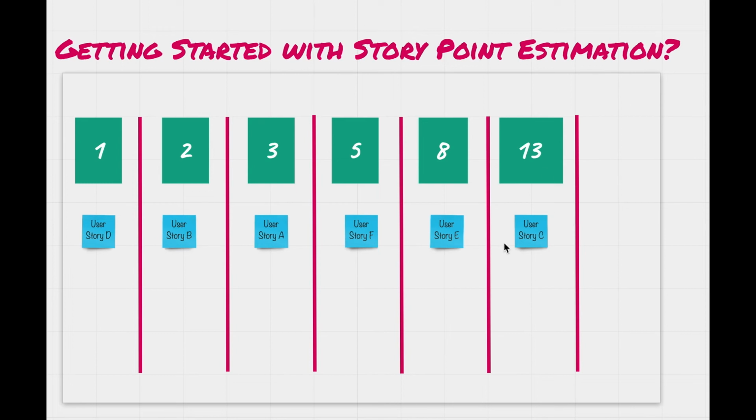Now this is the thing that we are doing at the end of the sprint. We are doing this to make sure we map our effort to correct story points at the end of the sprint. Now you move to sprint 2. Now you have different user stories that you're thinking of doing on story points. A few things that you already have is a tentative idea of what is one story point and what is two story points, what is 3, 5, 8, 13, and maybe even more. Also, you will have some idea about velocity, how much story point was completed in that sprint. So while estimating story points for other user stories, you just have to now relatively compare with the previous sprint story points and give them some unit value.